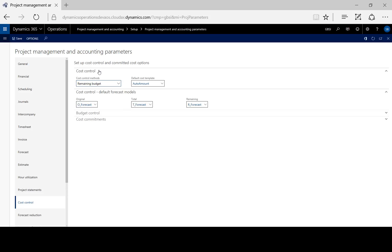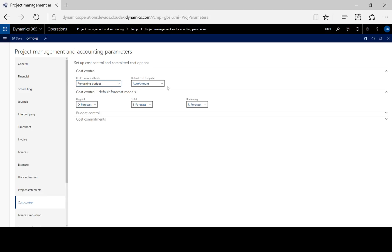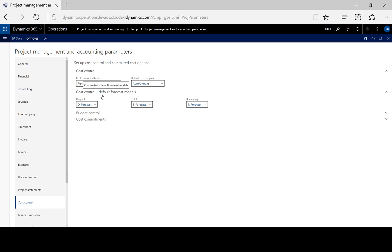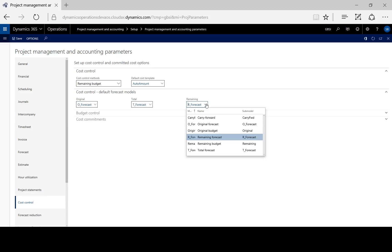So under cost control, here we specify whether we want the cost controls to apply to remaining or total budget, and which cost template to use as default. Obviously, we can create new templates. Here, we choose which forecast models will apply to our original total and remaining forecasts.